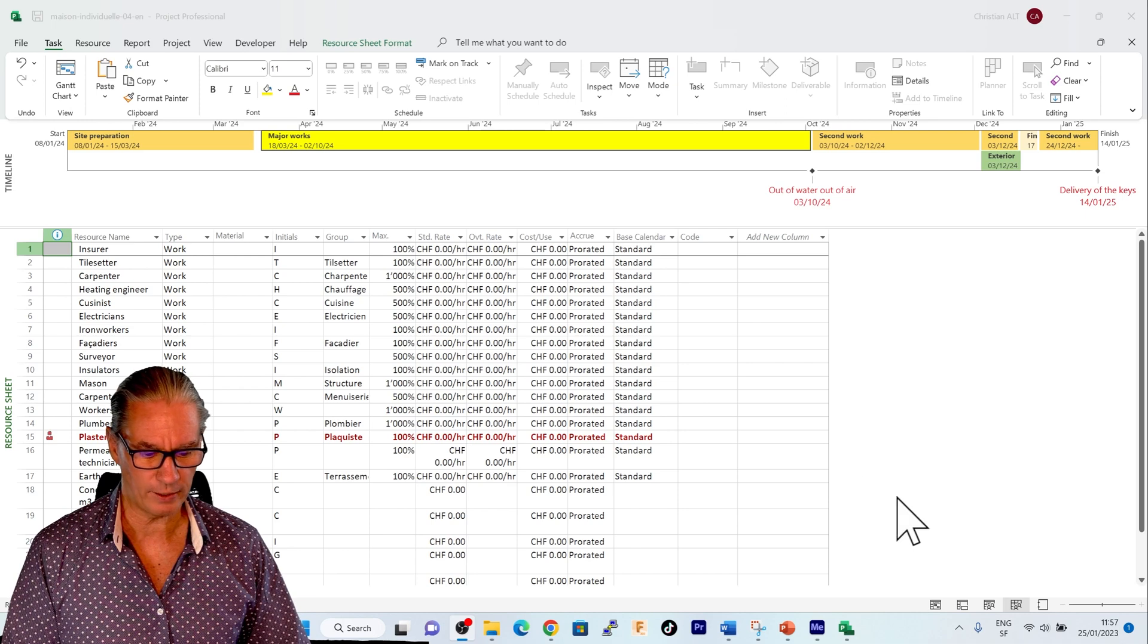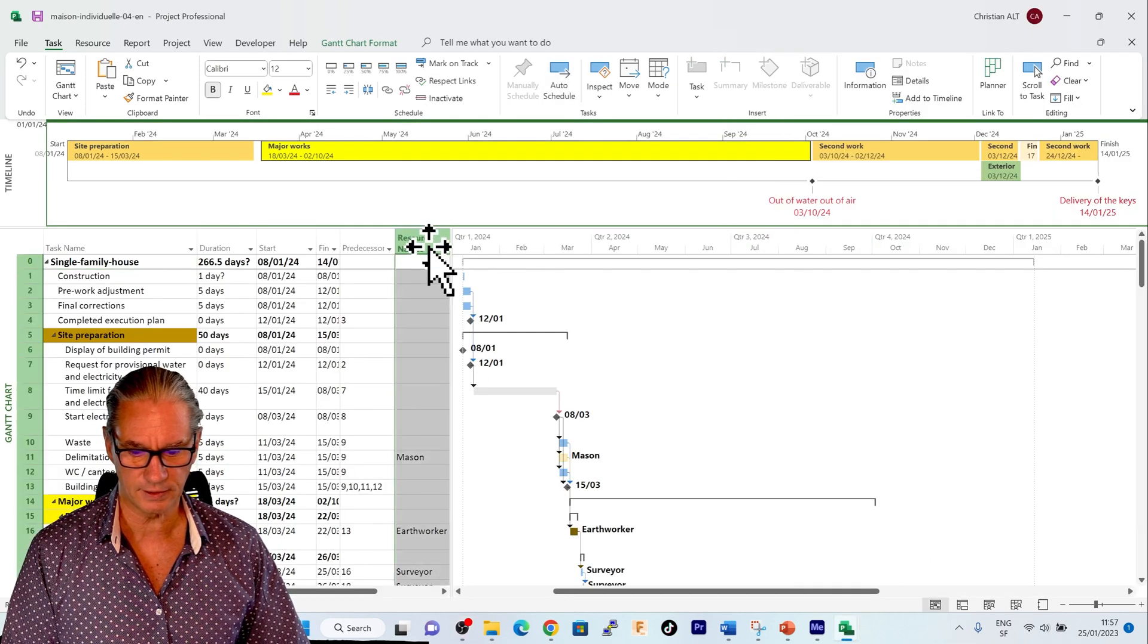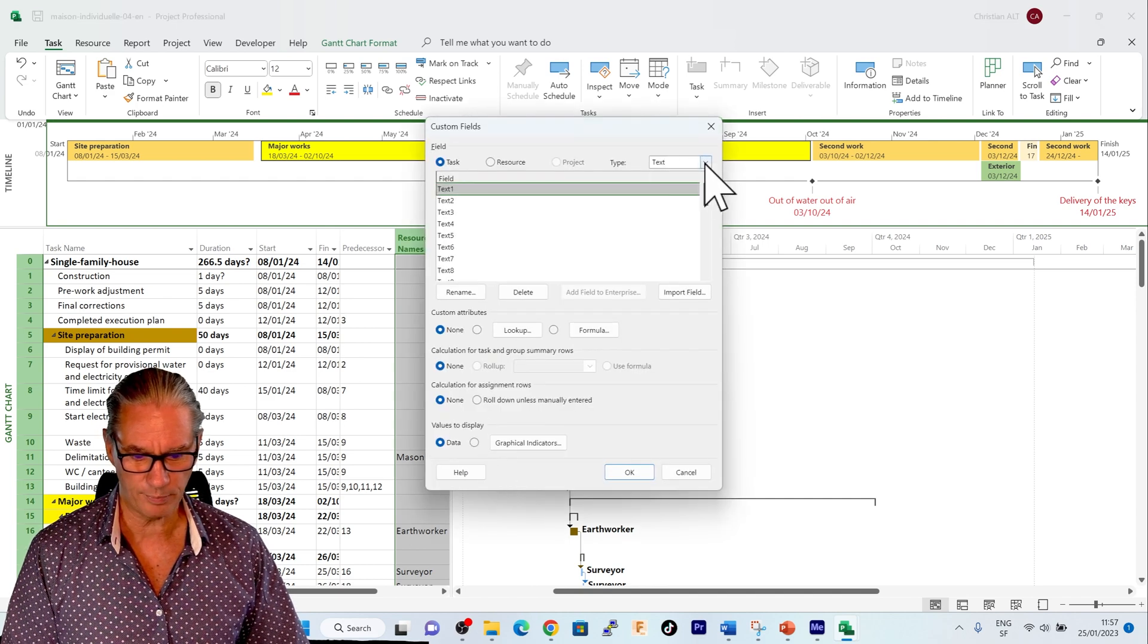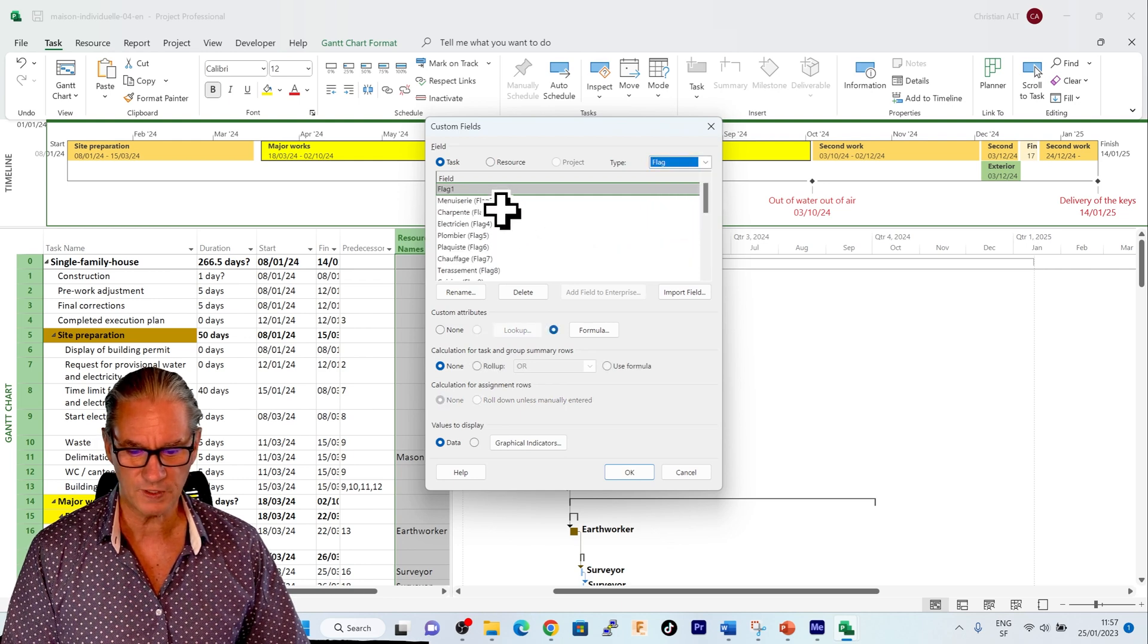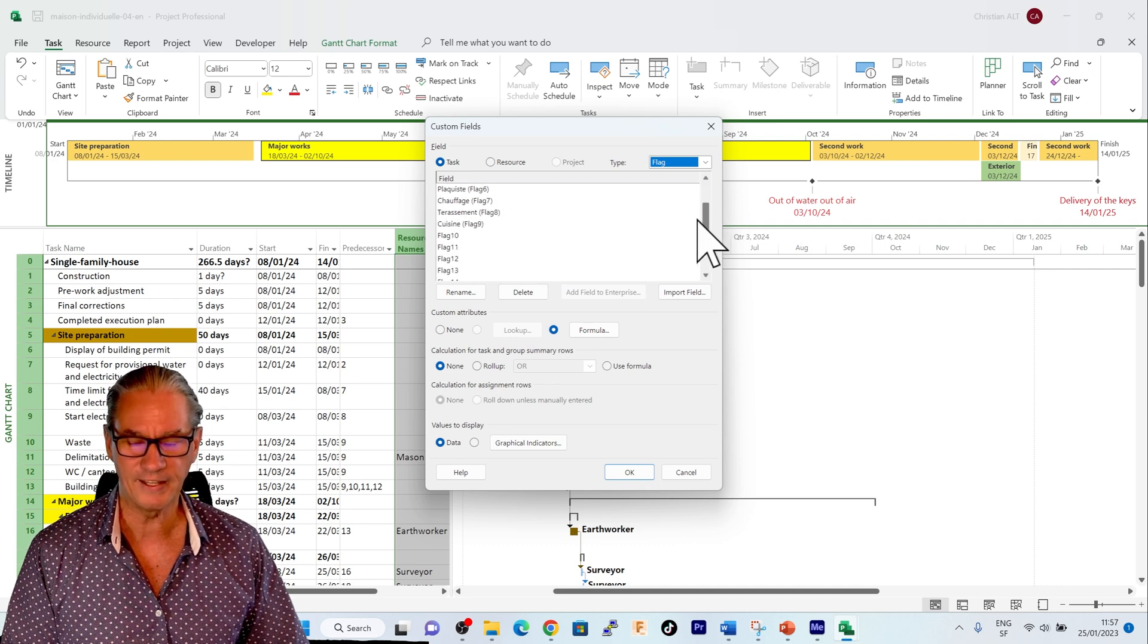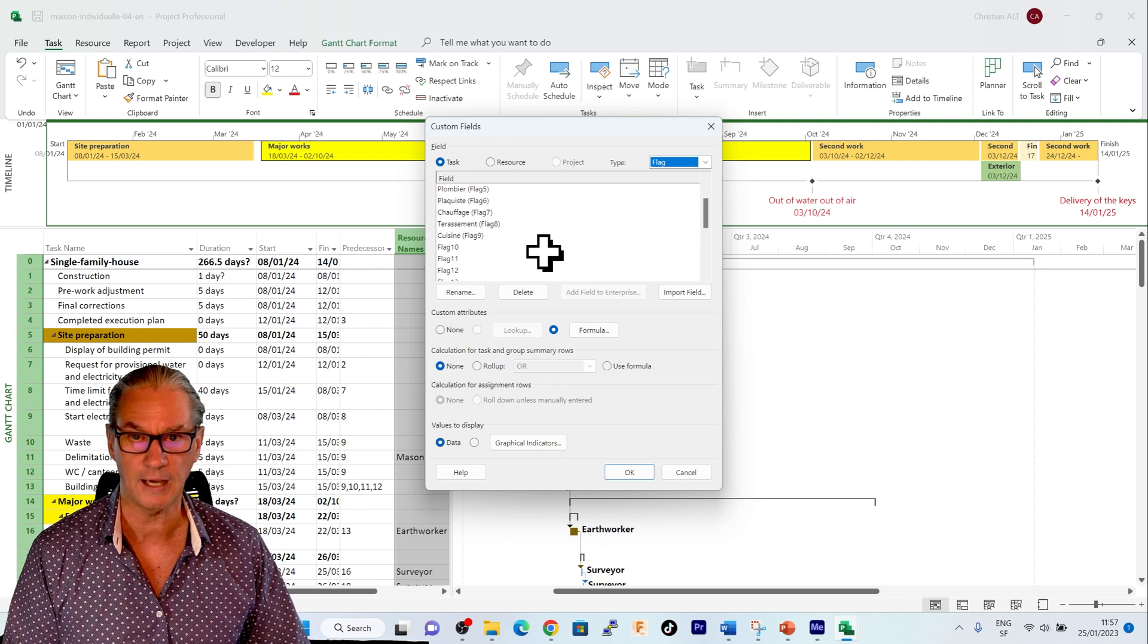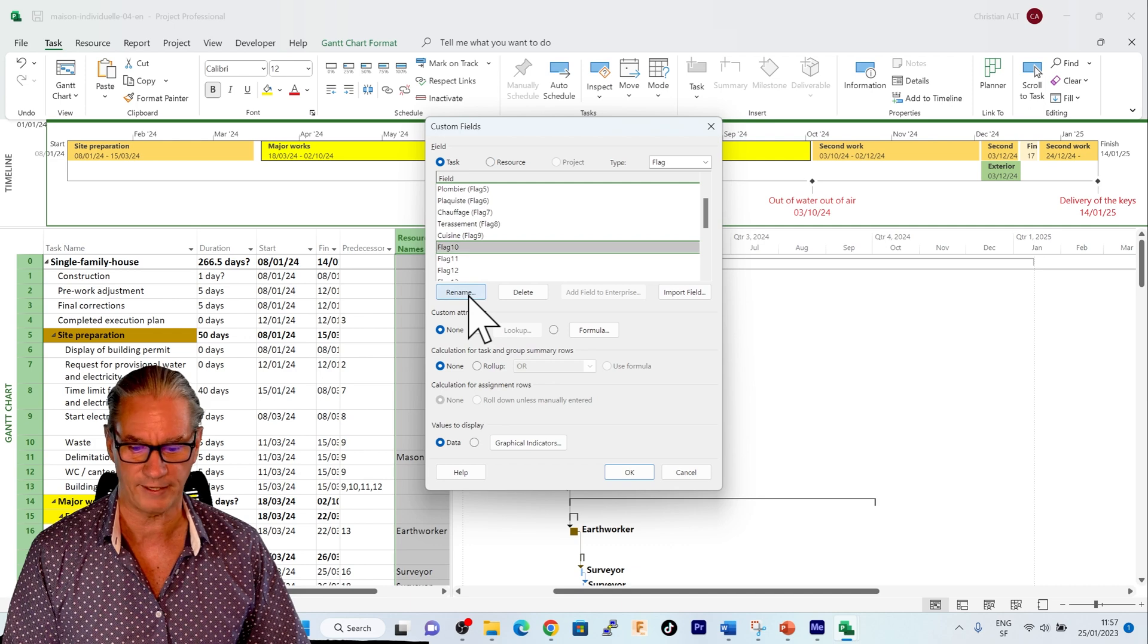I will now go back to the Gantt chart. I will select the custom fields. And the type of field that interests me are the ones defined as flags. And you see that there are already quite a lot of flags which are defined. They are all the other trades that will automatically be colored. So I choose here the next flag which is available, which is flag 10.